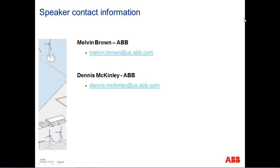substation, for example, you want to make sure that you consider the full build-out of the plant. Even though you only have one transformer to start, you can have a position in place where you have the second transformer foundation and transformer oil containment completed, or you can have the foundations for the breakers in place, or you can have the buildings where the switchgear is going to be included. You're going to have enough space to add future additions.